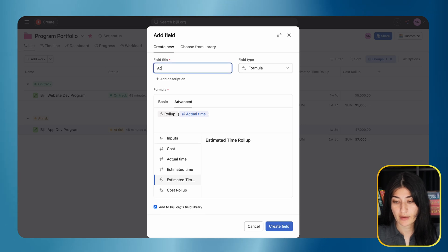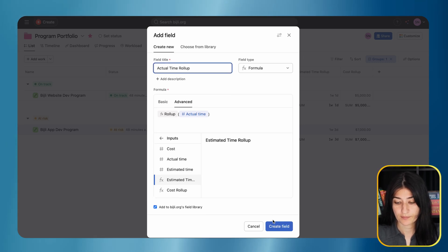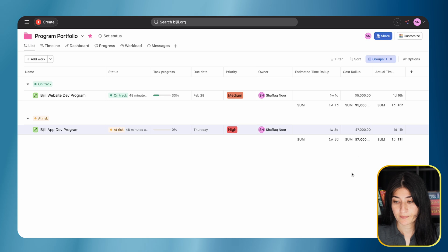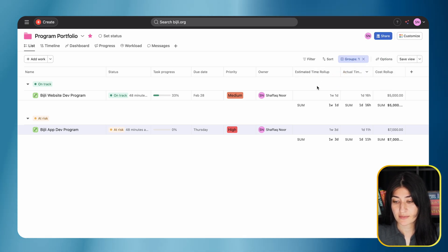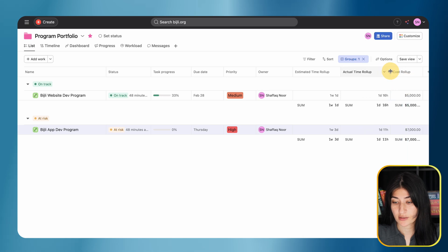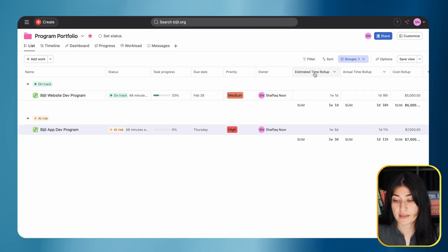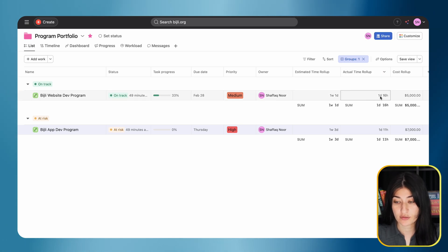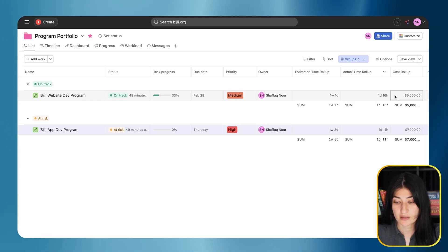Let's create the actual time roll-up field. There we go. We have our estimated time, our actual time, and how we're tracking to it. I have a total of one week and one day for my estimated time. The amount of time I've actually tracked to those projects is one day and 16 hours.